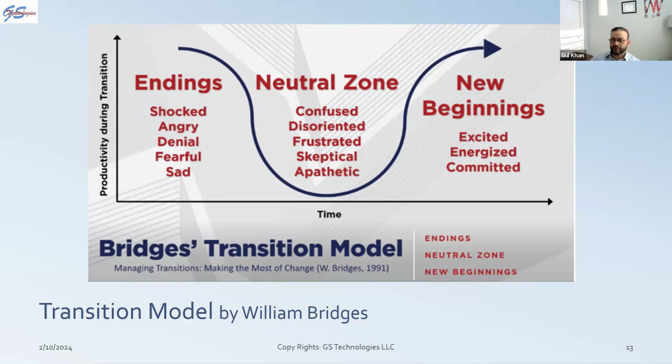I said, no, you need to set up your development team and your testing team right when you are working on your requirements. They said that's too much cost. I said, yes, it is a cost, but we have to do that because we are transitioning from old processes to the new processes.